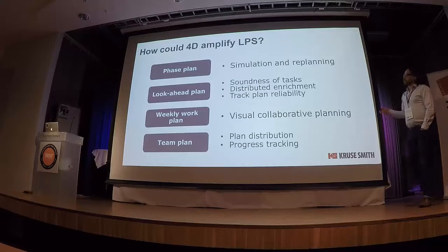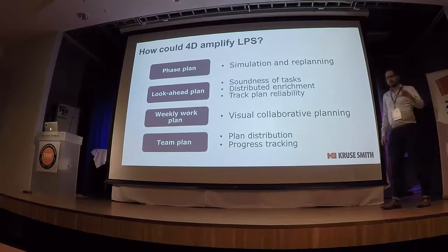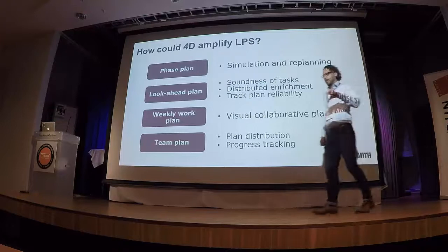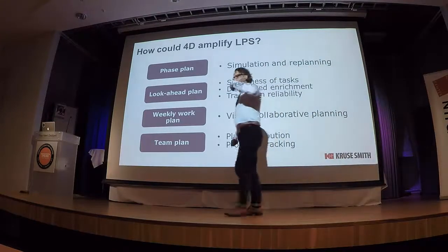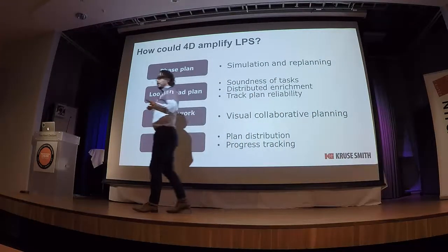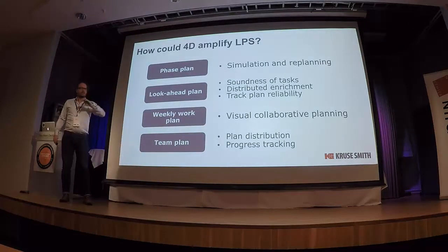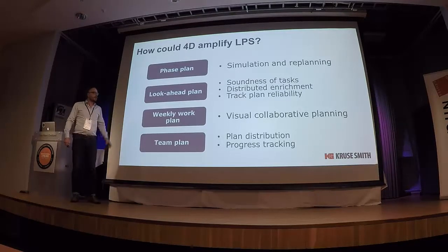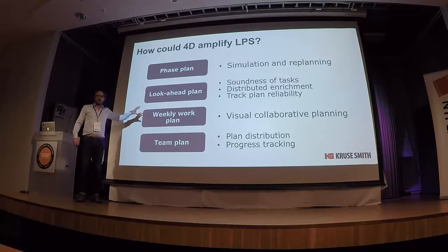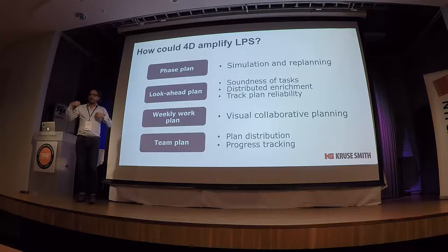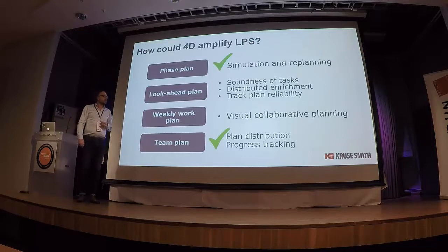The next one is to bring up SYNCHRO in the look-ahead meeting to really actually work on the constraints in the meeting and use the model to really enrich every step down there. And the weekly work plan needs to be in a collaborative, tactile way or something. The planners or the workers have to interact with each other in a social process, I guess.